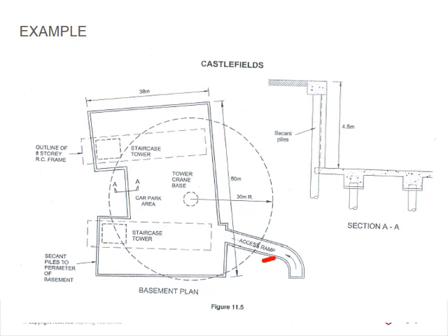And then there will be pedestrian access via scaffolding access towers. The volume of the excavation material is approximately 9,800 square meters, and the program duration for the works is 4 weeks or 20 days. Okay, so then they can calculate how many trucks they need coming in. You will see that on page 250, where they actually do the calculation of machine output. There are 25 loads per day that they have to take out.